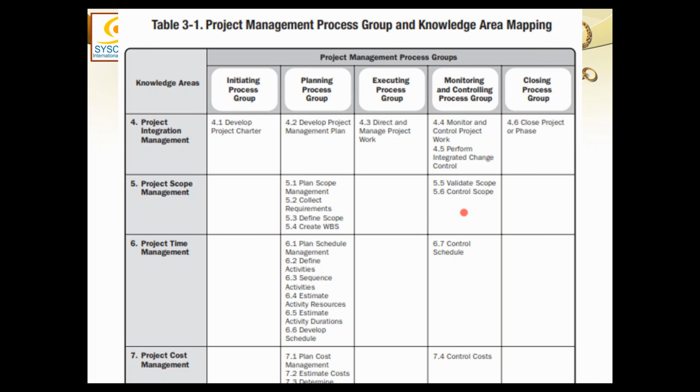Like, how can we define a project? I have to construct a house. If you say the project is construct a house, this is very ambiguous. What kind of a house do you want? How many rooms should it have? I don't want your full requirements, but I should know that this is a 3-bedroom house. This is a single story house. So you say single story 3-bedroom house. This is the scope of the project, to be completed in the next 9 months within a budget of this much money.